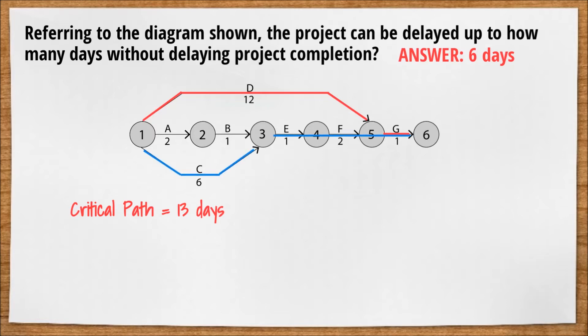Path 1, 3, 4, 5, 6 would take 10 days, giving it a float value of 3, since 13 critical path days minus 10 float path days is equal to a float value of 3.